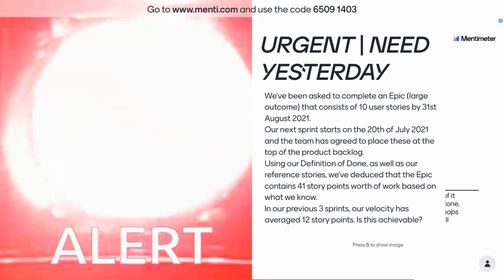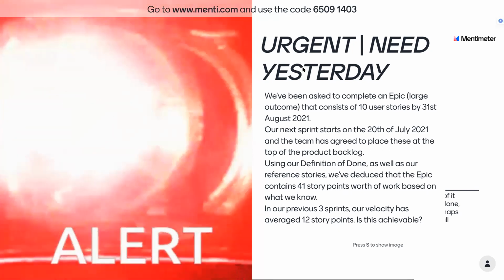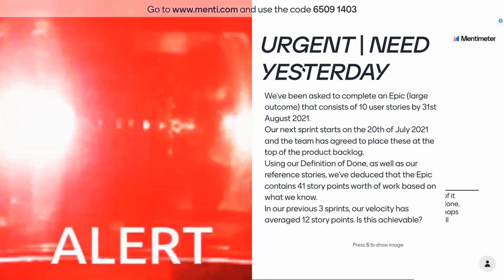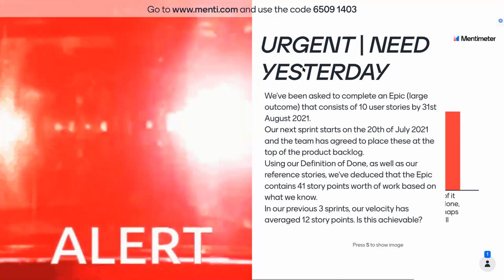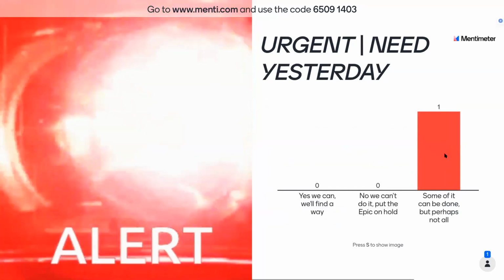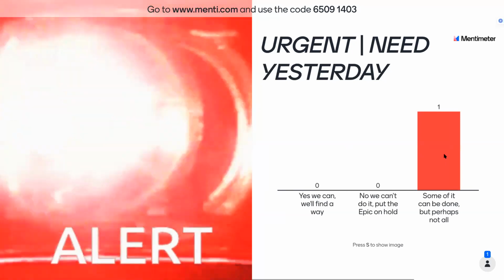Looking back at what we've accomplished previously, our average, taking the last three sprints, amounted to 12 story points completed. I want to know from you guys, from your perspectives, is that achievable or not? How would you answer this question with those three responses below?